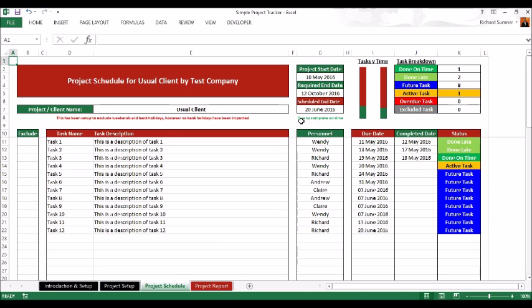This one here, as you can see, says due to complete on time because it's due to finish on the 20th of June, but I put in the 12th of October. If I put in, say, the 22nd of June here, when the client wants it, it still says due to complete on time. But if I put the 18th of June, it says not due to complete on time. That obviously means that your scheduled date, as per these dates down here, overruns the date that the client needs it. So that is something that you immediately need to look at.